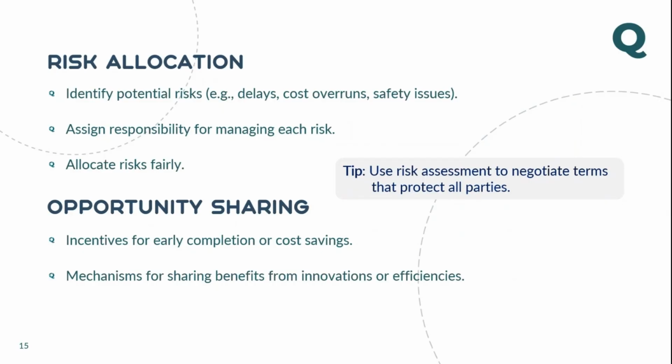Then you also have to think from this perspective: if I take some insurance, can I cover those risks? If you're foreseeing some delay damages, can I take insurance to cover my delay damages? If customs clearance of goods is your responsibility, but there is a lot of complication with that, can I transfer this risk to the employer and ask the employer to take this responsibility? Or how to avoid this kind of risk?